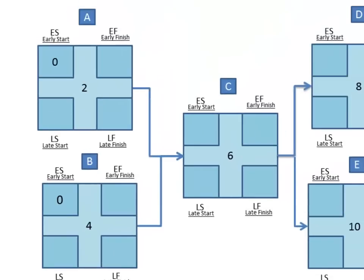Now for task A, we need to determine the earliest time the task can finish. To do this, let's add the early start to the duration of the task.